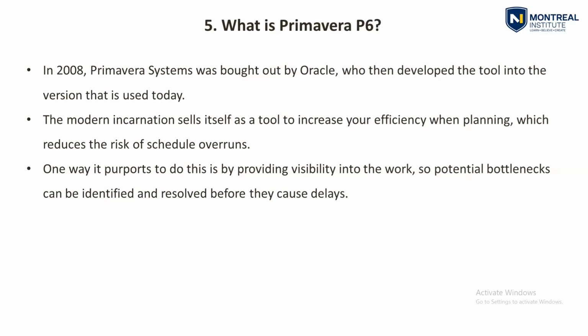As with the look ahead program, you can have a 1 month look ahead program as well. From there, the project manager will distribute those activities to the responsible persons to quickly execute those activities on site and mitigate those delays in the project.